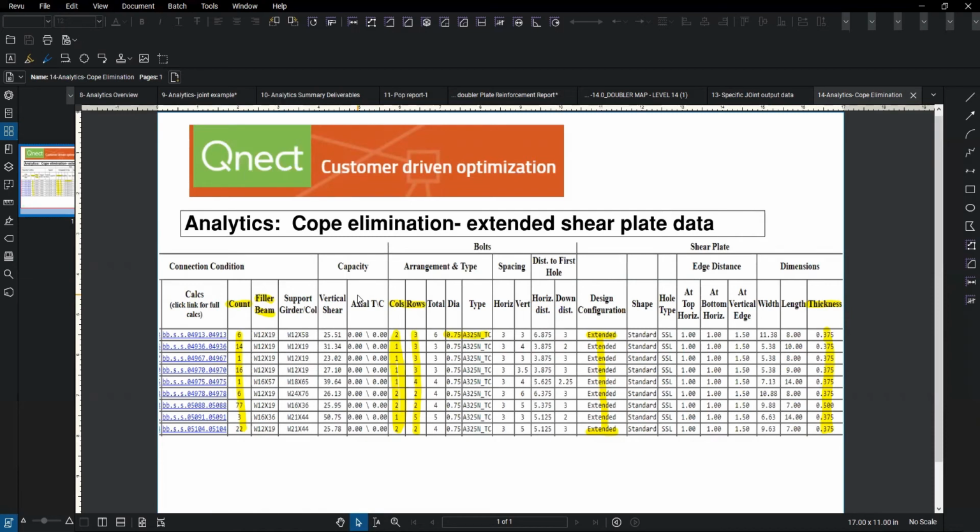What would that be as a pricing opportunity? But you have to know the trade-off. Are the plates now 1 inch thick or double pass welds, or are they single pass welds? So you get to examine the quantity, the number of bolts, the thickness of the plate.